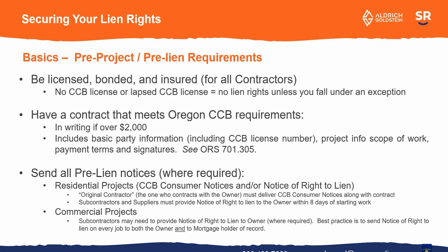If you're a subcontractor or a supplier on a project, then you have to provide the notice of right to lien to the owner within 8 days of starting work. So not necessarily the first day that you're on the job. The law actually protects you for 8 days prior to starting work. As we will cover later, if you're a subcontractor or a supplier, it's a good idea to provide a notice of right to lien on every project, even if you're not required to.